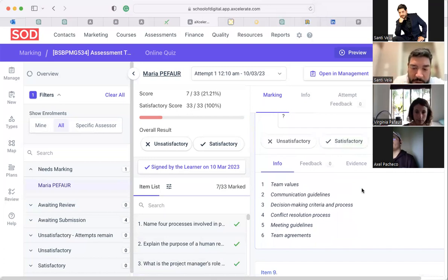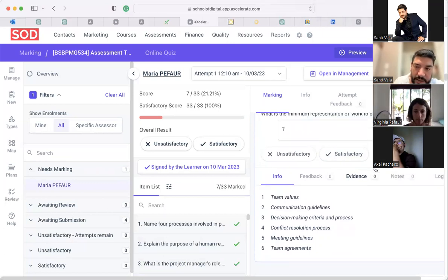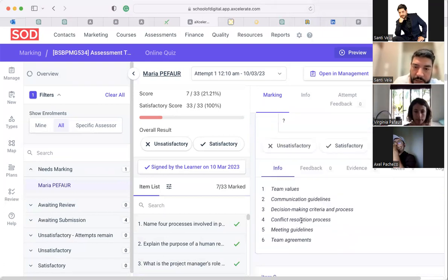If you can break down one activity, it's because it was not an activity. It was a work package. A work package, which is two activities somehow related. But if you cannot break down an activity any longer, it's because that is the minimum expression of work to be done. Okay. Right. So now you know it. Okay.